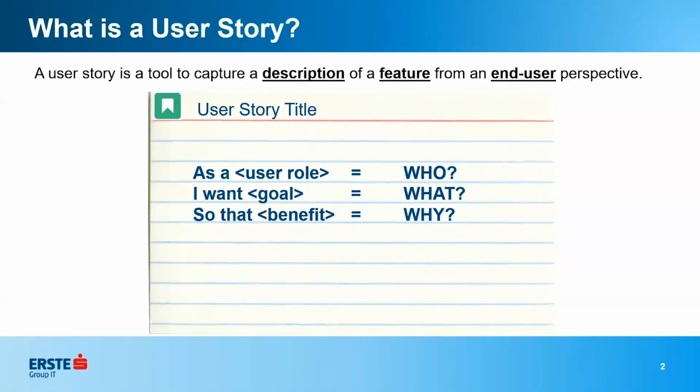And notice there's no how in the user story. So you're not looking for a solution here. You're purely looking for who, what, why. It should be like a short paragraph, one sentence. This is your story. But where do you put the how? When you start discussing how we think this is going to go, and when you're in refinement and you decide this is the solution we're going to go with, those you can either list further down in the description of the user story if you're using Jira, or you can add them as subtasks or whatever. They just do not belong in the user story description of who, what, and why.